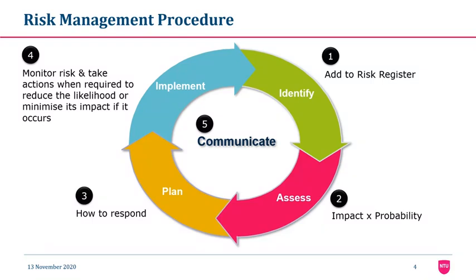And in the third step, we have planning. We should prepare responses to threats, for example, to help reduce or avoid the threat. Or we can plan for maximizing the opportunities, for example, if something positive happens to the project, we can take advantage of it. In the implementation phase, we carry out the planned responses mentioned in step 3, which was planning. And finally, we should keep communicating to stakeholders, keeping them informed about the situation of each risk and the future uncertainties in the project.